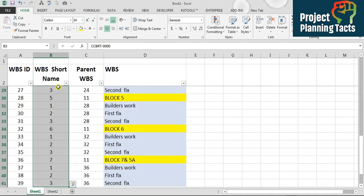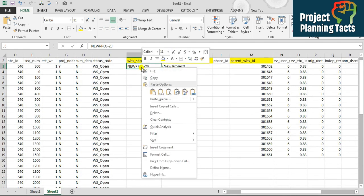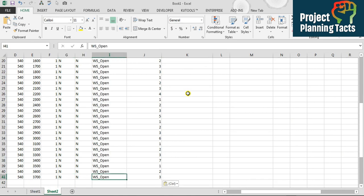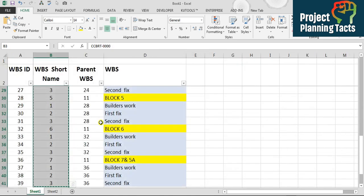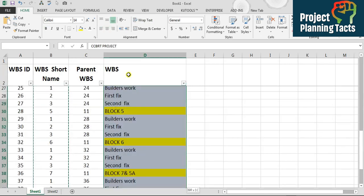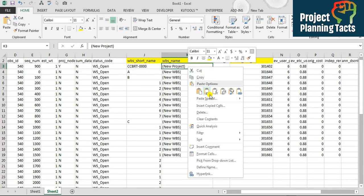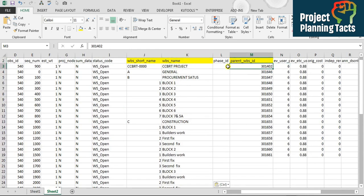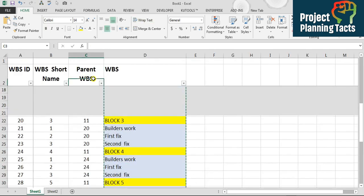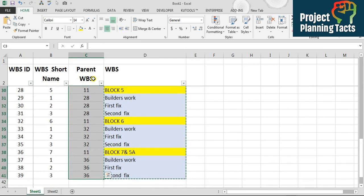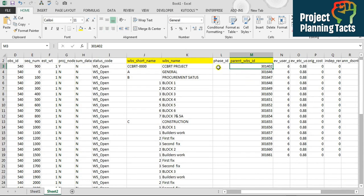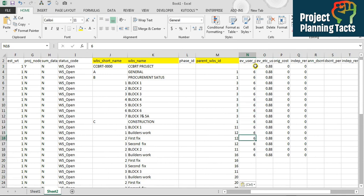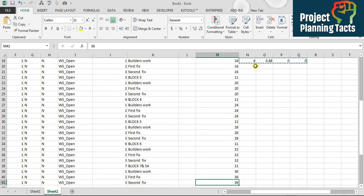For the WBS short name, I'll copy the range from the sheet I created earlier, go to the other sheet, and paste as values — done. For the WBS name column, I'll copy that range and paste as values here. For the parent WBS ID, we've already defined it in our WBS sheet, so I'll copy the whole range and paste as values. Everything else remains the same, so I'll copy and paste to the cells below.